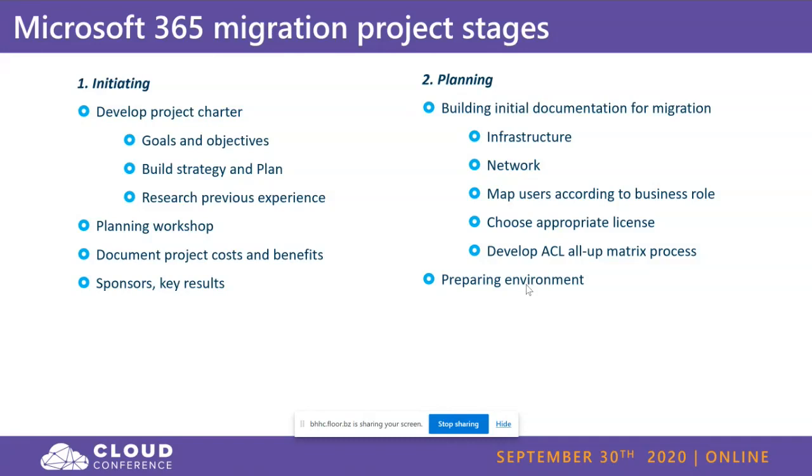Basically, we saw a lot of issues during the migration with the users. We saw some timeouts, and at the beginning we didn't understand why. After several troubleshooting steps, we noticed that the server was overloaded during the migration. The server was very, very old. It was stuck, and that's why the migration didn't work from time to time. During the night, we noticed that the migration worked well, and then during the day, sometimes the migration simply stopped without any error, it just stopped.